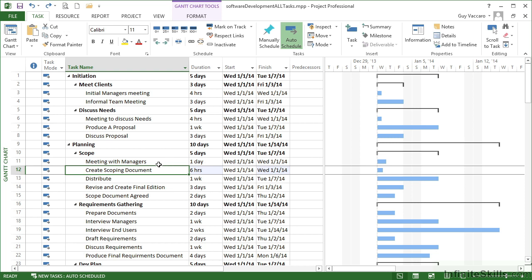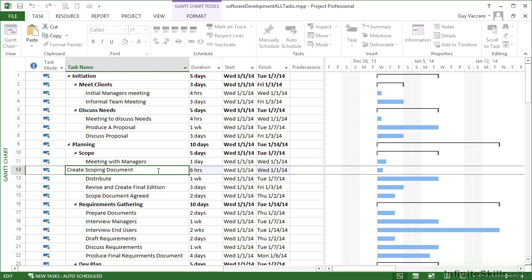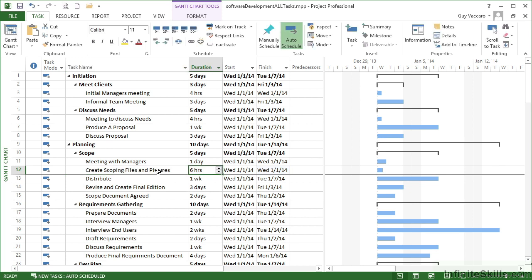If however, what I want to do is only change part of that, so I want to effectively edit, then I can do F2 while I'm on the cell, just as we are there, just like you can in Excel. And that opens up the task name box for editing, and you can see we're now actually inside. So I can make change, create scoping, set up the word document. I might want to say create scoping files and pictures, and then again I need to move to left, right, down or even up for that to be accepted as the task name.